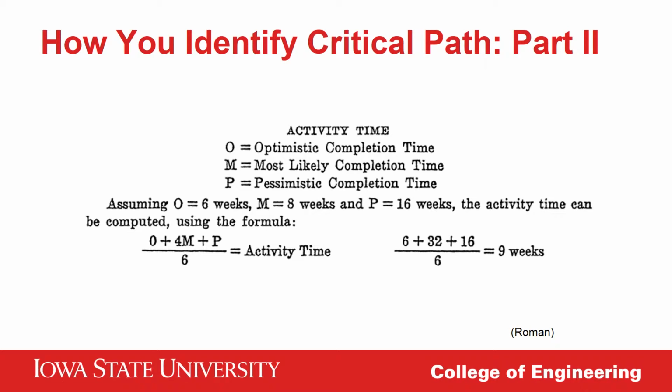Unfortunately, this also makes including economics for each activity difficult, though there is some software that helps with this analysis. Also, like the critical path method, the diagram for PERT charts is simple to understand. More information can be included on each node, such as the range of completion and start times, slack time, and duration, but that makes the chart less intuitive. So what can we do to simplify the visual representation of task duration and identify slack time?